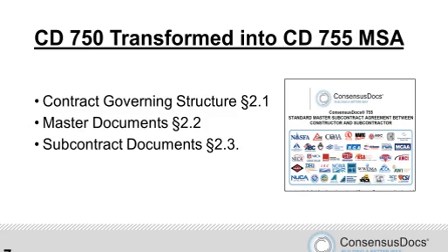And then from that, as each specific project arises, there will be a project work order, which is the 756 form, that the parties will modify and execute, or execute something that is equivalent to it. And that document itself will incorporate the MSA by reference, and also incorporate the necessary terms of any prime agreement, as well as any other critical terms for the creation of the project-specific agreement. So we start off with that important principle that establishes the parties' understanding of how exactly this document is intended